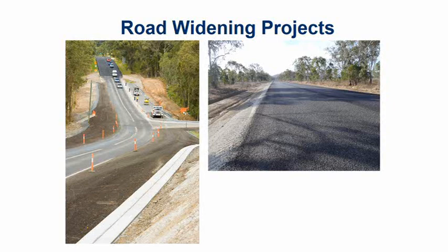But we couldn't look at them as individual projects because we didn't have enough data around capital costs for each individual project. So we looked at it as one lump sum capital cost, and we looked at the benefits of the whole stretch of the Bruce Highway, again taking averages for the traffic volumes along those various stretches. So we calculated the benefits as a whole and then divided it by the overall proposed cost for those widening projects. So we get an aggregate result for the whole thing. Again, we can't compare individual projects using a benefit cost ratio. We can calculate the benefits for the whole stretch of the Bruce Highway for those types of projects and what they're likely to get, and you can break it down later on. And I think overall the benefits were higher than the costs.